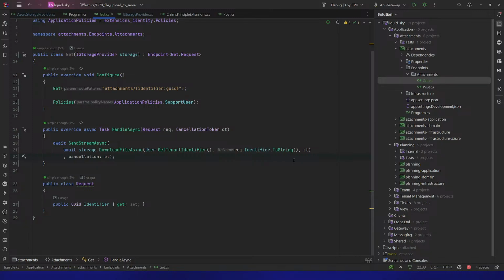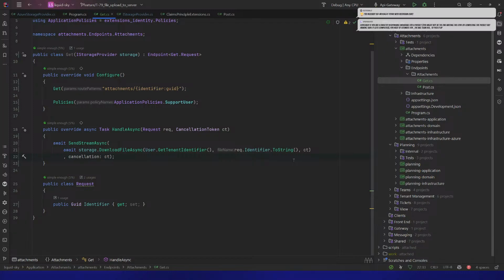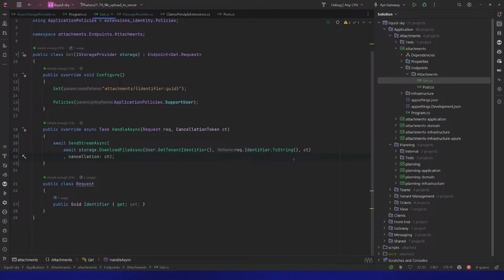So the idea there is that I pointed one. I should explain why it's easier. The problem there is, what if you are less experienced, you should not necessarily give in to me, right? And this is where this often becomes a push and pull. I say it's a one, you say it's a three. We don't meet in the middle and say it's a two. That's not the right way to do it. We have to discuss and make sure that we actually have the same understanding. What we're doing is removing assumptions.